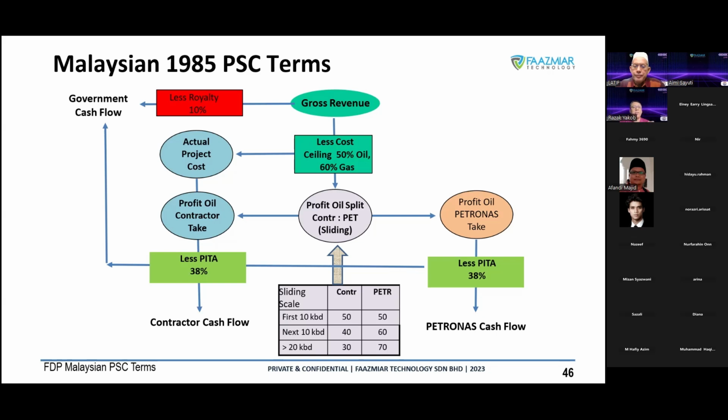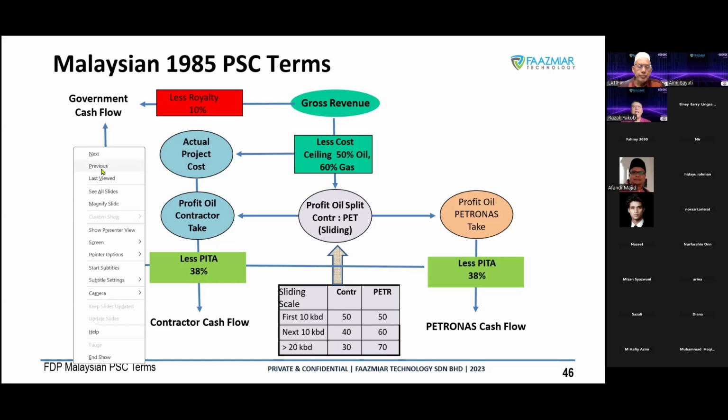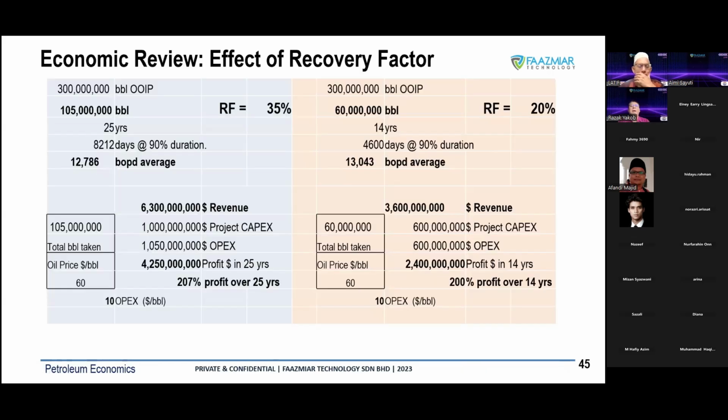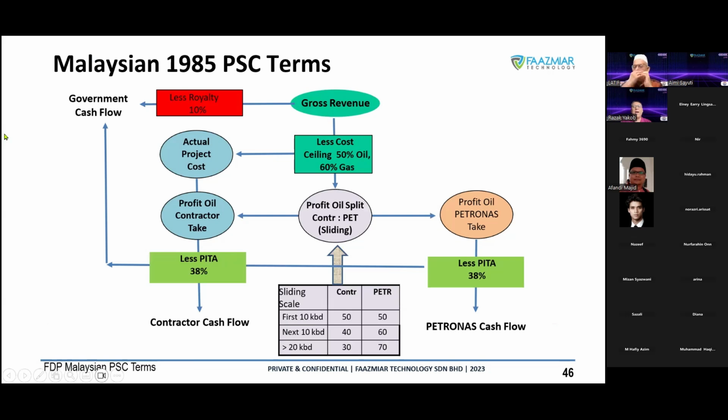Whether it's just drilling or the overall project implementation, it is done on a daily basis, because we know what is coming in, and then we project every single day. We project and see whether we are actually going to overrun or underrun. We discuss ahead of time, so it's not going to be a surprise.